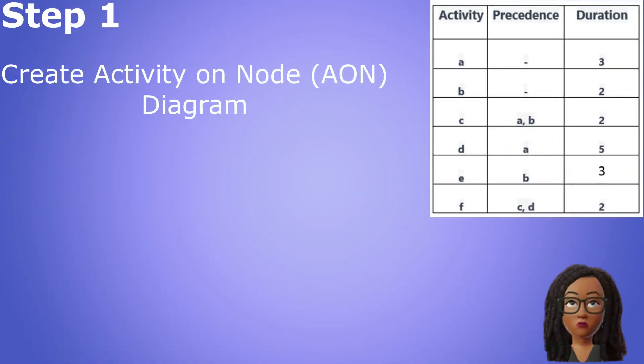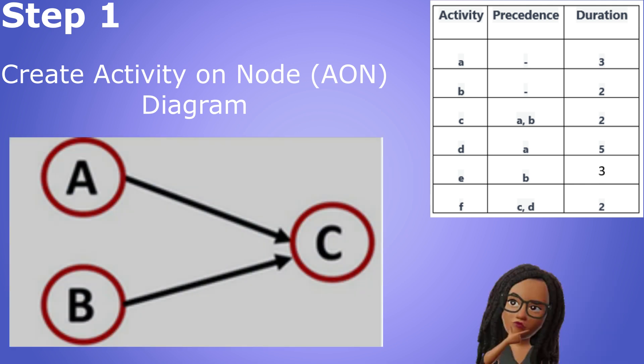Step one involves creating an activity on node or AON network diagram to represent the project. An activity on node diagram is one in which the activities are represented by the nodes, while the arrows show what activities come next.